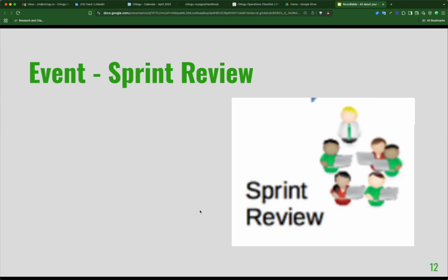And that's really valuable because in older project methodologies like waterfall, you didn't get those reviews at the end of each sprint. Sometimes you would get them maybe monthly, or depending on the length of the project, maybe every 3 months, or maybe just at the end of the project. And that's why so many projects, when the review wasn't done on a regular basis with your end users, you'd get surprises.